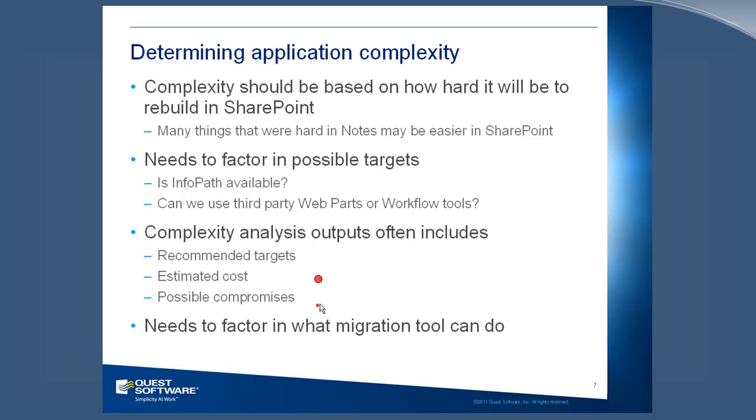And so this really helps two things. It helps the customer understand what their trade-offs are, and it helps them truly save money. But also, it helps you present quotes and estimates for doing this work that aren't all based on the worst case scenario. If you do an analysis report that assumes that every single feature and every single form has to get migrated, then those are going to look like really expensive jobs, and you're less likely to basically win the project.